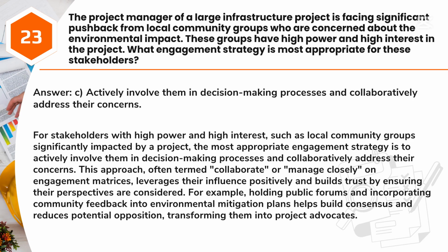This approach, often termed collaborate or manage closely on engagement matrices, leverages their influence positively and builds trust by ensuring their perspectives are considered. For example, holding public forums and incorporating community feedback into environmental mitigation plans helps build consensus and reduces potential opposition, transforming them into project advocates.